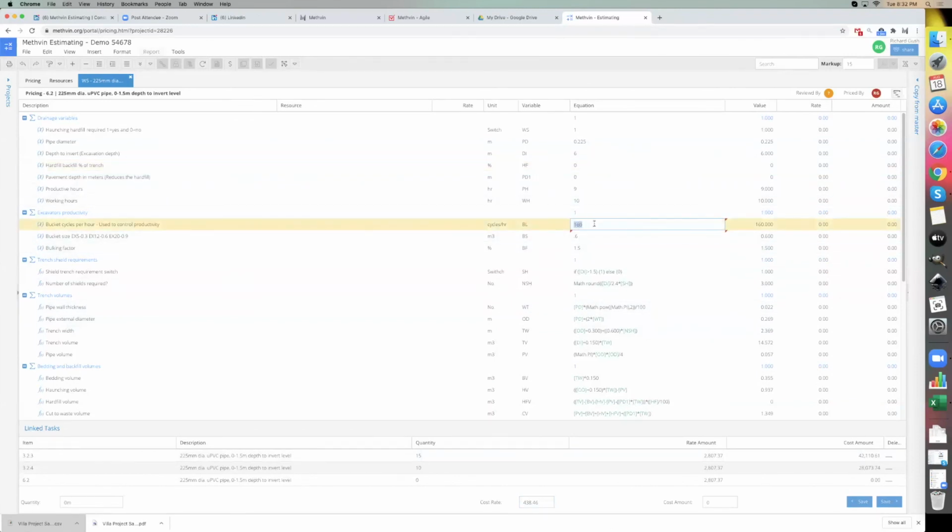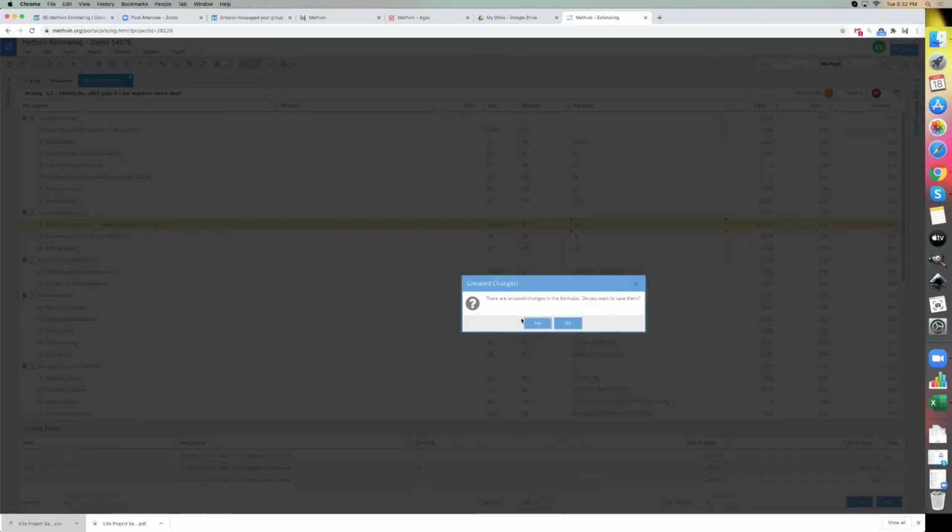Before we were only doing 40 cycles because there were a lot of services in the way. So that'll cost $1,330, there you can see, because we're going much slower with the excavator. But if we were greenfields and there was nothing in the way and you could do 160 cycles, you'd be able to do that for $438. Okay, so that's the pricing side of it.